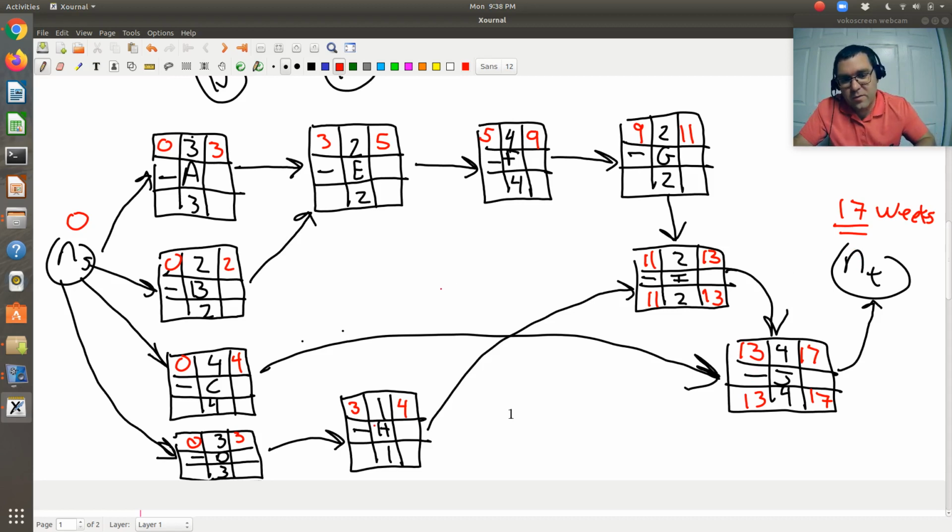Also looking backwards from J, J is connected to C. So C needs to be completed before J. So the latest possible finishing time for C is 13, right, in order for J to start on week 13 and complete on time. It has a duration of 4, so that means the latest possible starting time of C is 9. Okay, so that takes care of C.